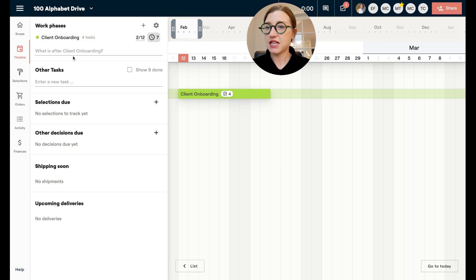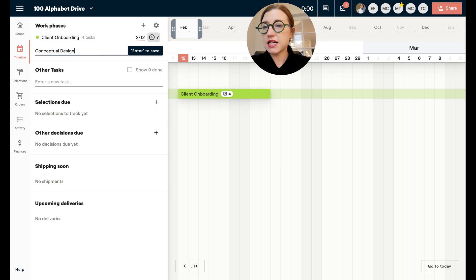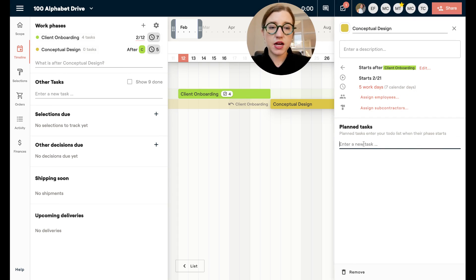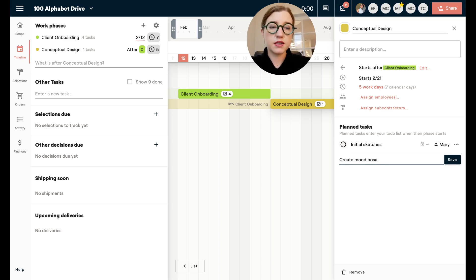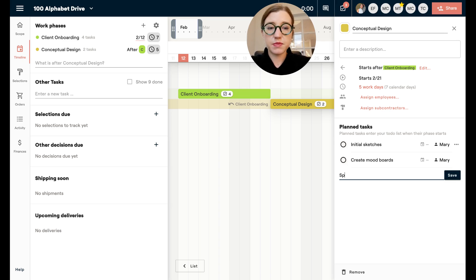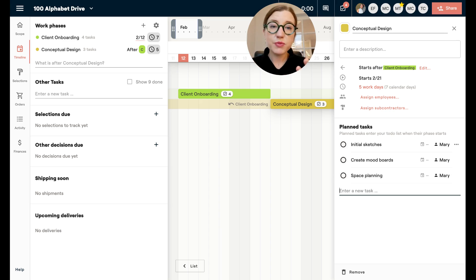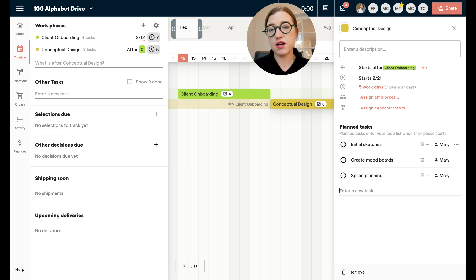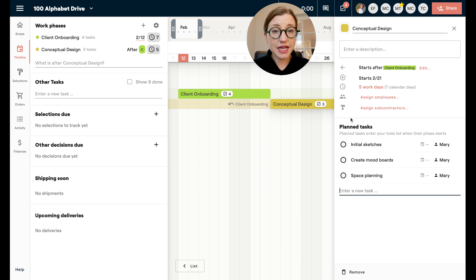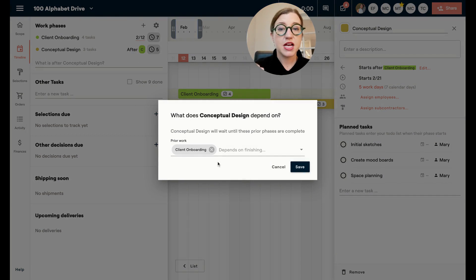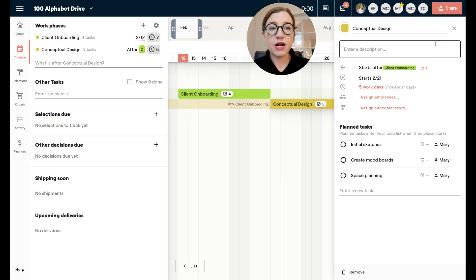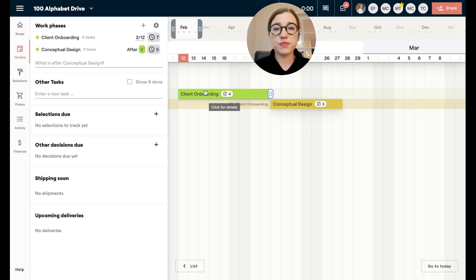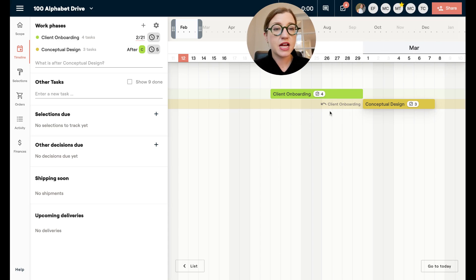Moving on to creating our next phase — this might be conceptual design — and inside of that we're going to add tasks like initial sketches, creating mood boards, and space planning. You can break this down however you like. All these planned tasks are things your team is well aware of. The thing I want to show you with additional phases is that this one comes after client onboarding, so I have a dependency built in — if I shift my timeline it's going to push that second item as well.